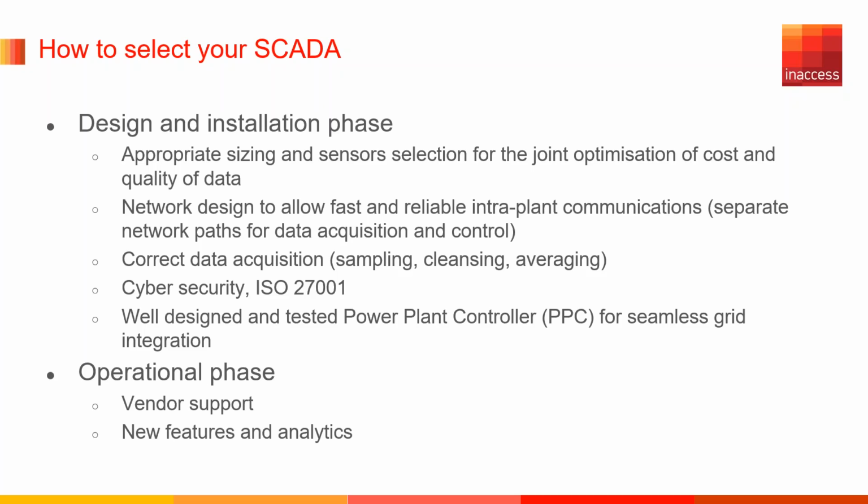And as we discussed before, also the selection of the power plant controller is very, very important, because without a good and tested, well-designed power plant controller, most probably your asset will not be connected to the grid. The COD will be delayed by days, weeks, or months, and this can be catastrophic.